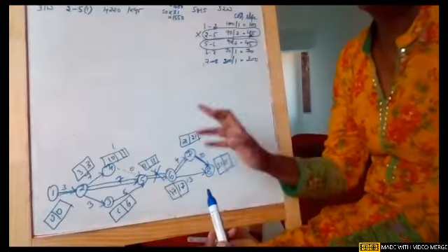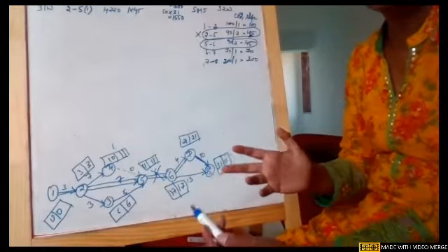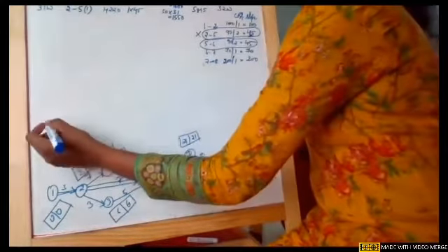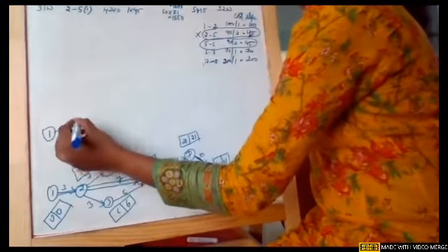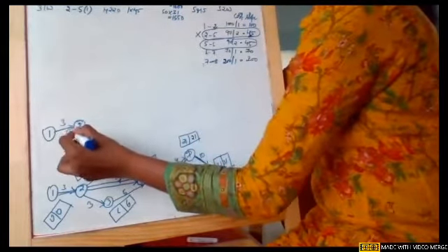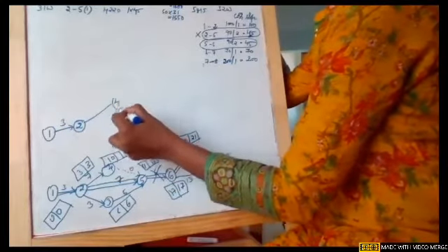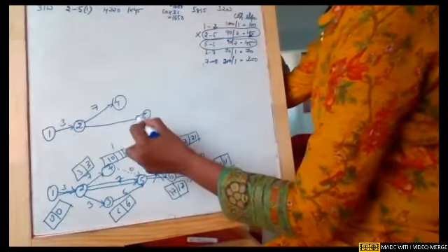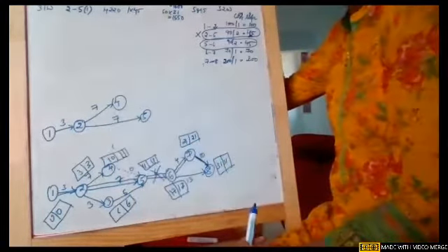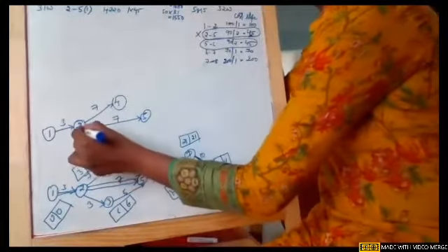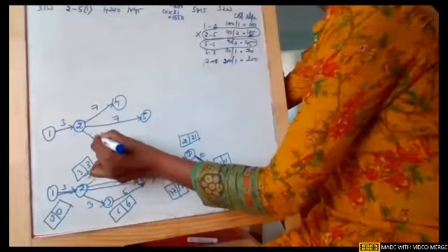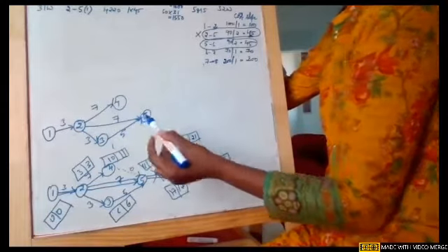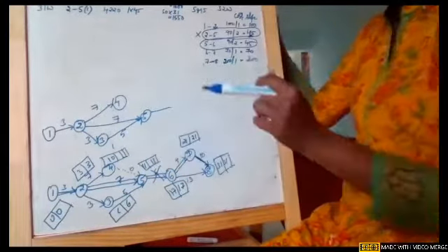So when we see the network, for the next network, we can clearly understand that activity 5 to 6 has been crashed. Again, same thing. Go back, start constructing the network. Again, we need to construct the same network. 2 to 4, the activity 5 to 6 is being crashed. And 2 to 5, it will be remaining. We can't write 9 again, girls. It will be 7 only. Once crashed, it will be the same thing. And 2 to 3. And 3 to 5. It is 5. And 5 to 6. Now we are crashing 5 to 6.